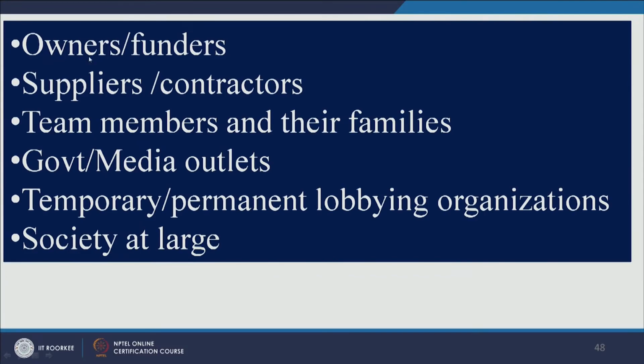Now, as I said, apart from internal and external stakeholders, you can also have owners and funders of the project, suppliers and contractors, team members and their family members. Government is also a stakeholder, and nowadays media is also a stakeholder. You can have temporary and permanent lobbying organizations and society at large. So, these are a couple of stakeholders. So, whenever you take up any project, you need to identify who the stakeholders of that project are.